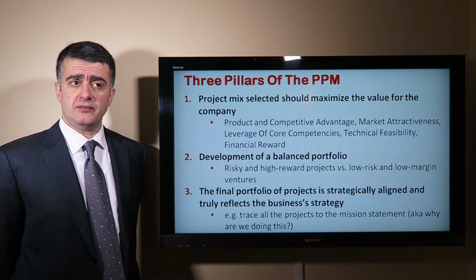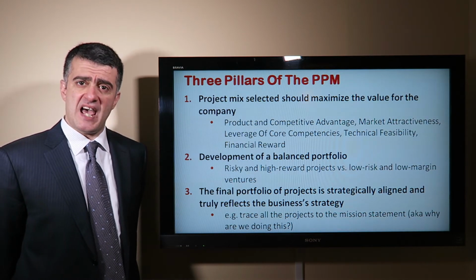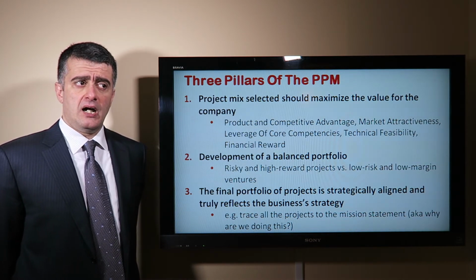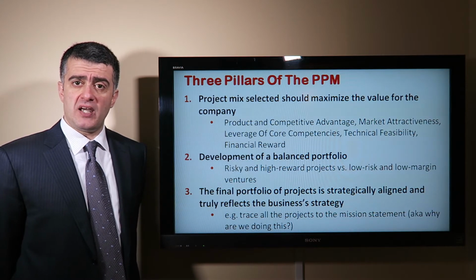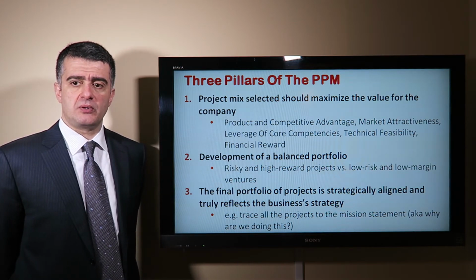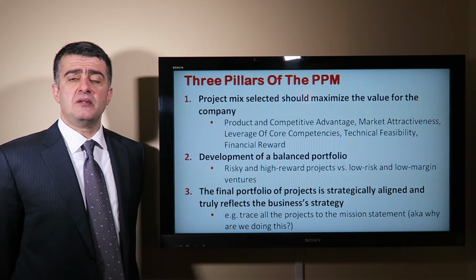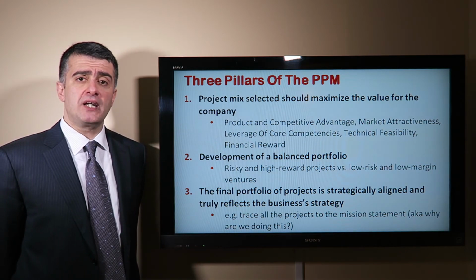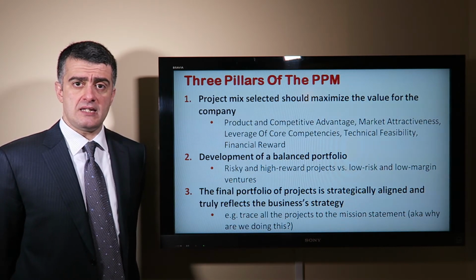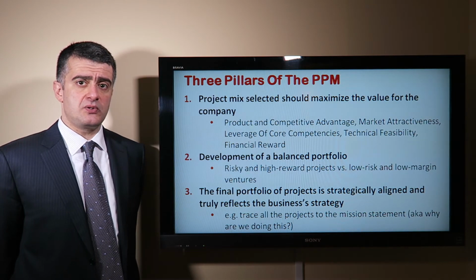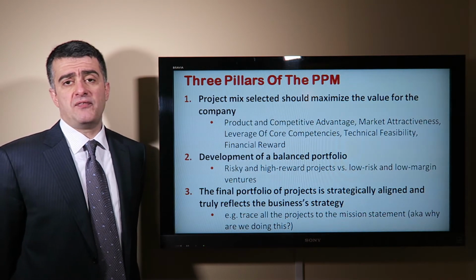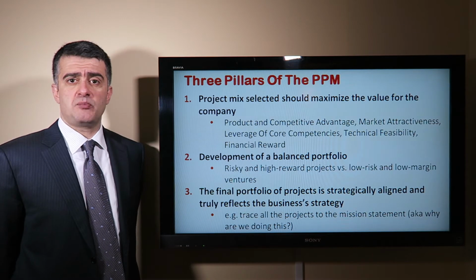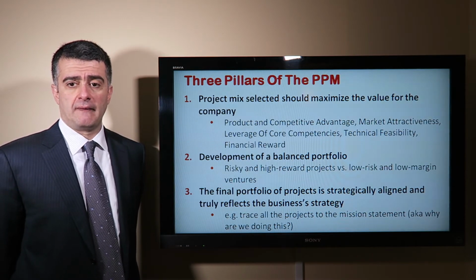Leverage of core competencies, which implies, do we have in-house resources to develop this? Do we have in-house knowledge and know-how to develop this product? Technical feasibility, how complicated is this project? Is this a small project, a medium-sized project, or a very large one? And financial reward, say net present value or return on investment.